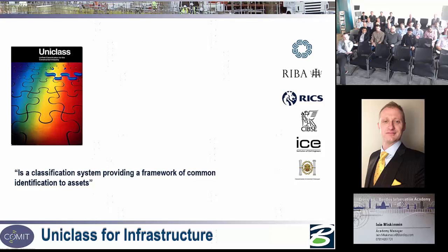If we all call things differently, there's a problem, because we need to classify things the same across the board, not only project to project. So when two contractors start to federate their data, they understand that a beam is called a beam, and not a beam and a beam I1-4 and a beams or steel or whatever it might be, because that takes away the impact of bringing together federated information, but it also brings in risk.